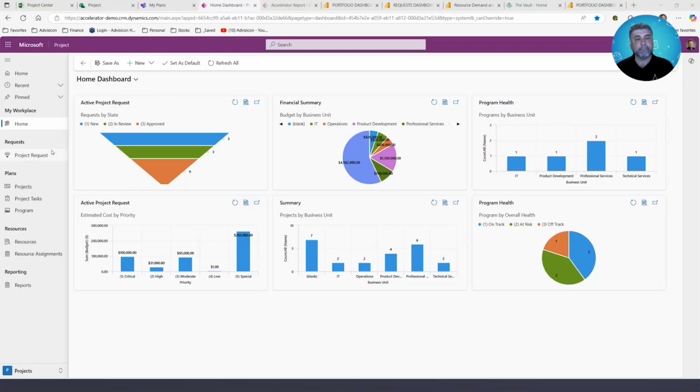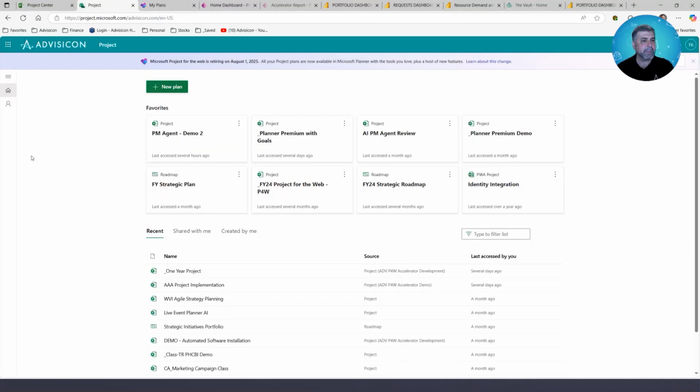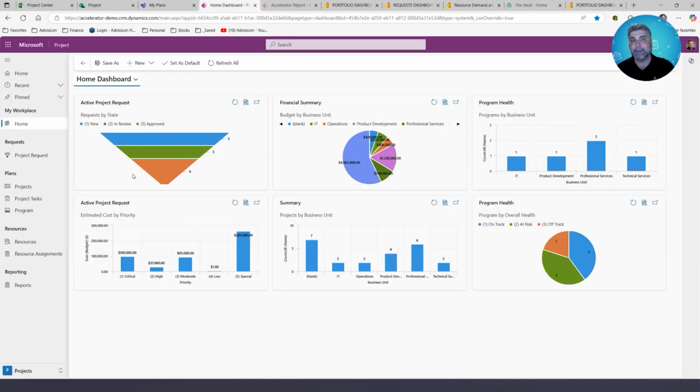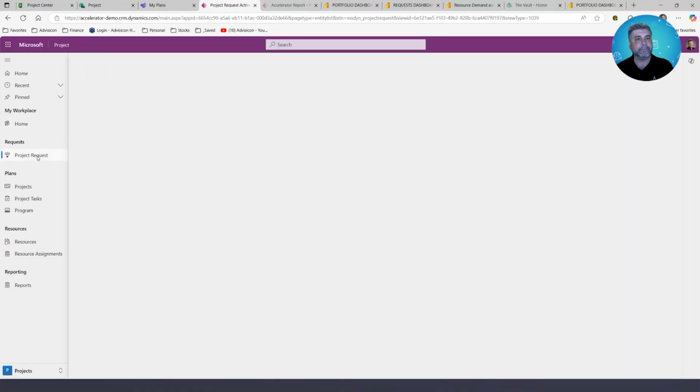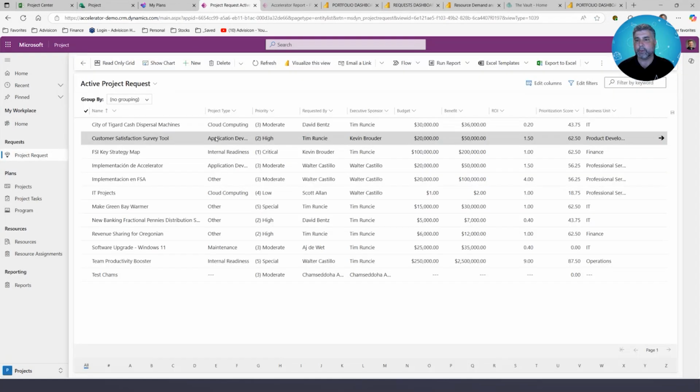The idea of working with your plans or your schedules is that you may want to start off with an intake process. Think about that: an intake process that leads you through the fact that not all your projects are going to open up and immediately be projectized. I may want to start with requests where I can vet them, understand what the request is, and ask: do you have all the information? Do you have a sponsor? Do you have budget? You might have to think through these.